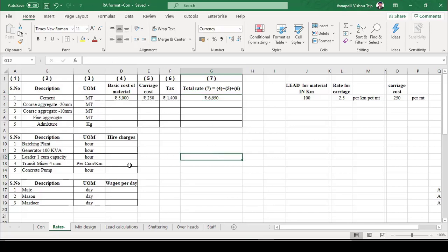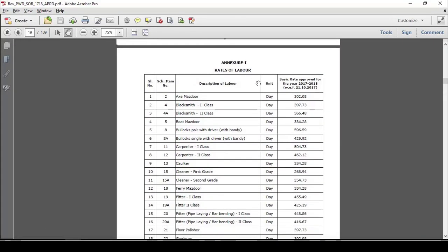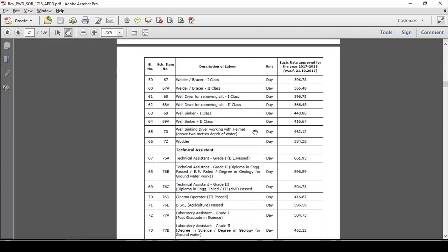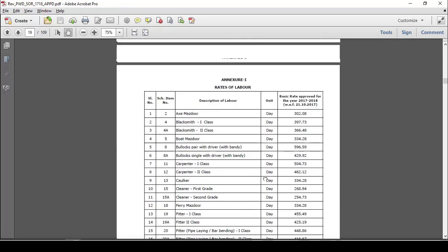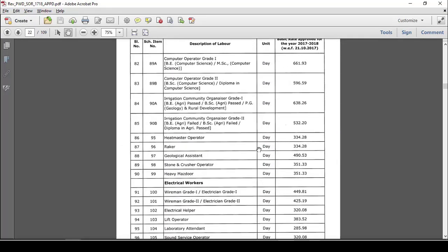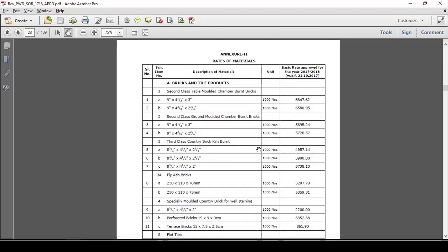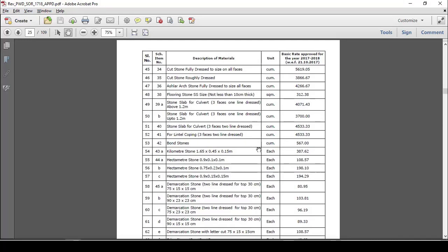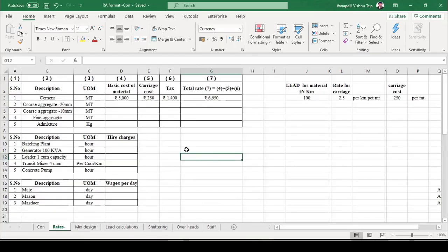Here is a sample standard schedule of rates published by the PWD department. It consists of labor wages per day, rates of materials per unit, and rates of some works analyzed by the PWD department.